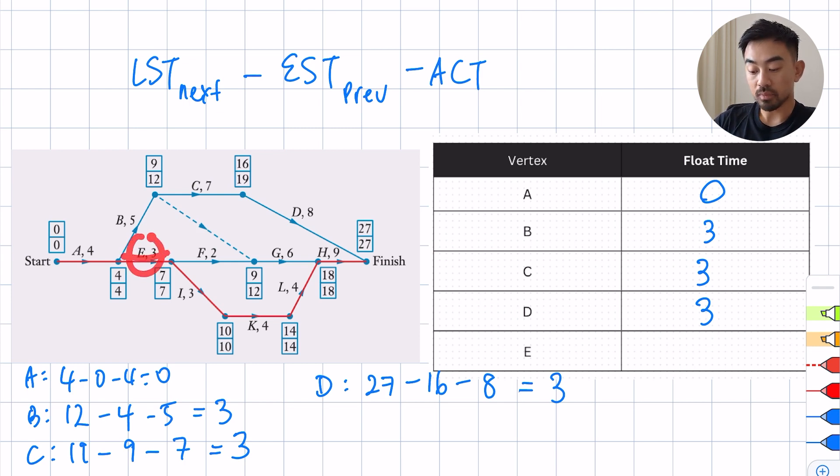Now let's do one more which is E. E you can see is here. Now because it's already on the critical path you should know that it's going to be equal to 0, but let's just make sure. So E will be 7, the bottom box of the next, minus 4 of the earliest which is there, and then also minus 3 which is the activity. So 7 minus 4 minus 3 is 0 and we are done.